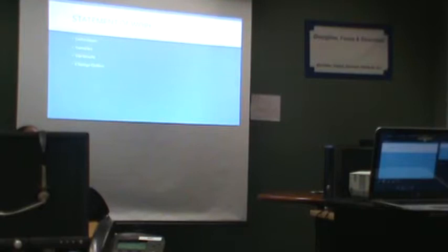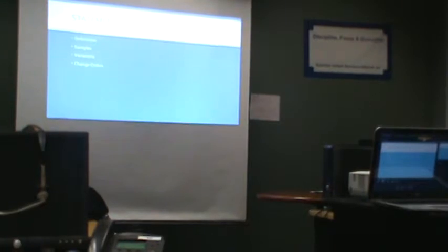Okay? Change request form, you gotta put the requester name, requester organization, date requested, date response requested by, the change requested. Describe the change. Hey, Barrister is now required to provide red and or green paper for every installation to mark DOA versus good unused equipment when being returned to Home Depot. That's the change. Okay, that's the change requested. Estimated schedule impact and estimated price impact.